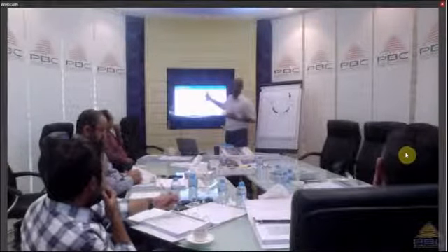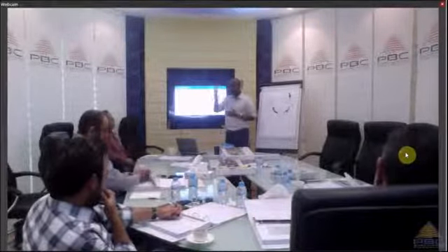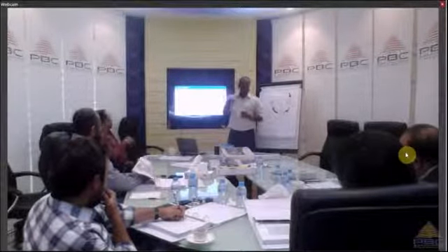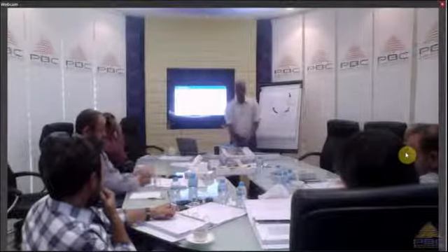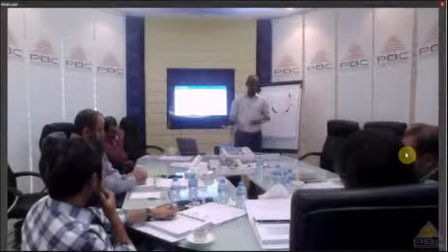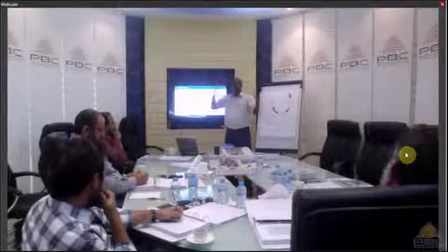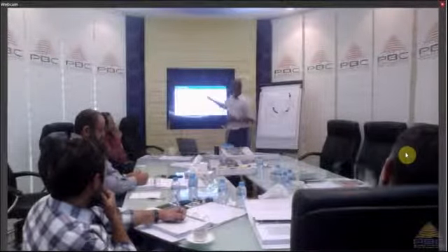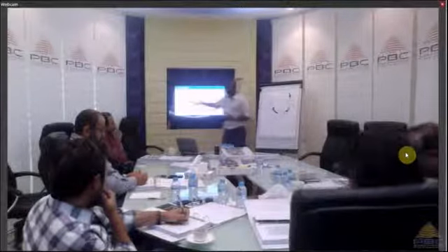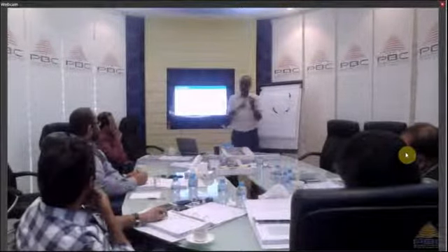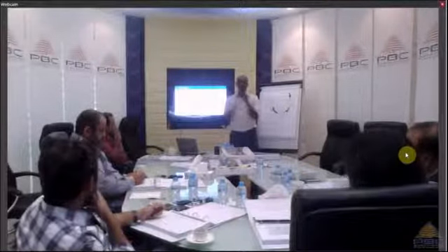In this document, you have to let the customer know what are the tests that he or she will run on the product in order to accept it. So we don't leave that for chance or for the client aspirations. We specify these things here. Then the deliverables. So this phone will be delivered to you in a box with the following accessories.